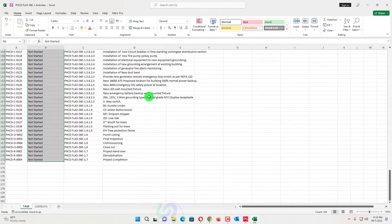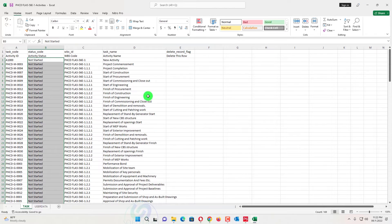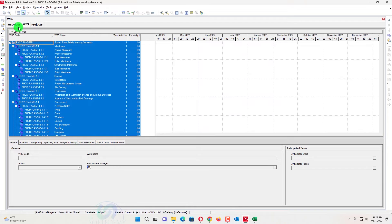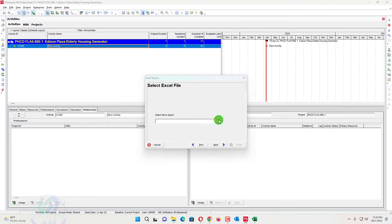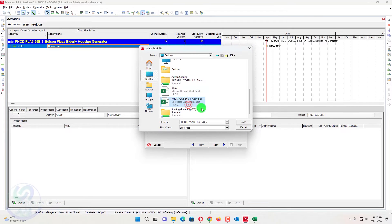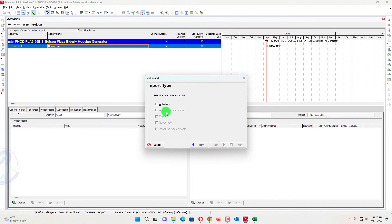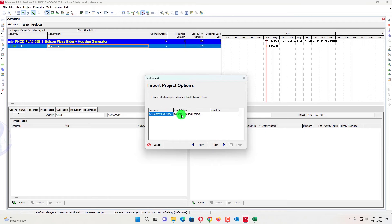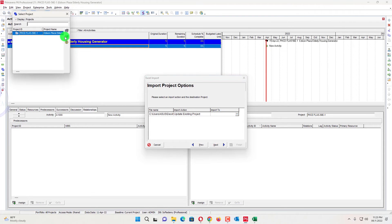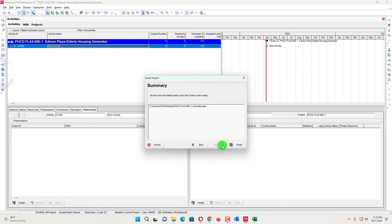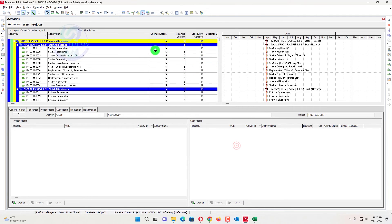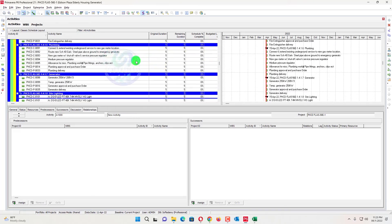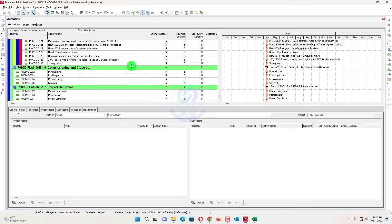You can also apply the TRIM command — equals TRIM — to clean the data. Set 'Not Started' for all activities, then Ctrl+S to save the file. Now open Primavera P6. Currently only one activity is shown. Go to Import, select XLS file, Next, import from desktop, select the activities file, Next, Activities, Next, select 'Update Existing Project' in the Import Action, select the project, Finish. You can see all the activities have been added under the desired WBS.